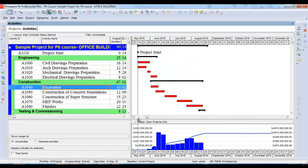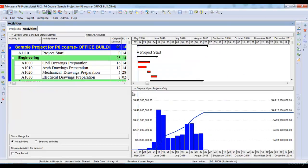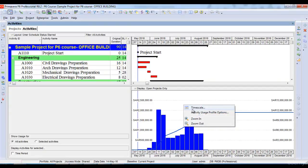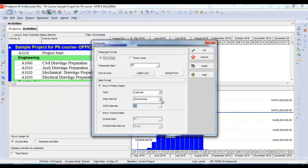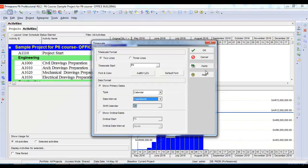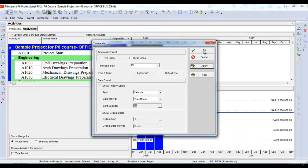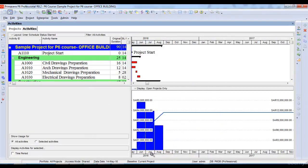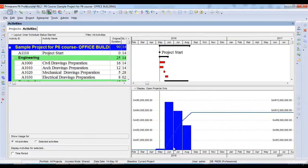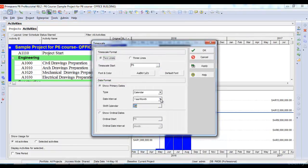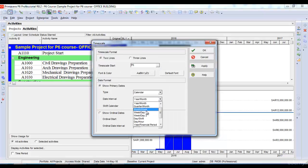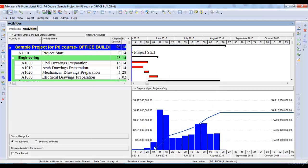Once I click on it, you will see that it opens a new window with a graph. Here you can see the cost curve of your project and the weekly or monthly cost of your project. You can right-click and change the time scale. If I change it to month view and click apply, it will give me the monthly budgeted cost of my project. I can change it to week view or any view I wish to see. This is my weekly cost for my project, and this is the cumulative curve.